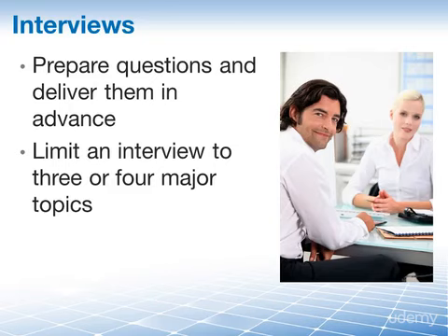Ask 3 or 4 more granular questions about each topic and continue until you feel that you have gathered enough information. But be aware of the interviewee bias, perhaps for a specific product feature that they like or a product function that is particularly important to the stakeholder you're currently interviewing.